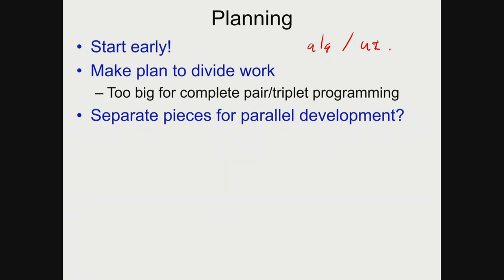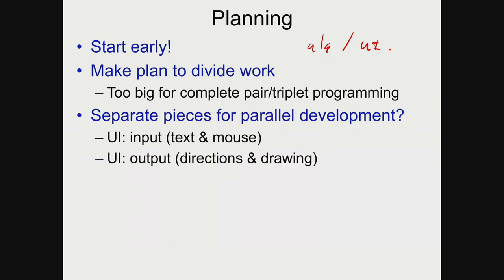So I guess one thing, we can go a little further. We can break up the input UI, which is actually independent of the output UI. We need to be able to, with both mouse input and text input, find two intersections. Well, you can write all that code and just return those two intersections, highlight them, print them out, whatever. You can confirm it works, and make sure it works no matter what the person types, etc. So that can be done as one task.